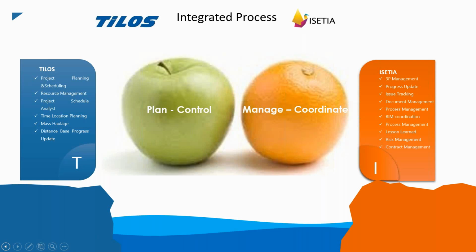It's a time location based planning system. It also gives a lot of specific printouts and planning capabilities, such as mass haulage planning, the mass haulage earthwork plan, and control. And Tilos allows our customers to enter progress distance-based or quantity-based, for their needs.